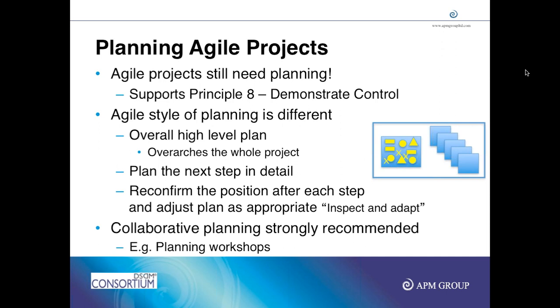Then, instead of the project manager making a detailed plan, the project manager delegates time box planning to the teams. Teams decide how to deliver the work that has been delegated to them. We avoid detailing in the beginning. We do detailing just in time. That is, task level planning is done in time boxes, whereas deliverables and high level milestones are planned as part of delivery plans.